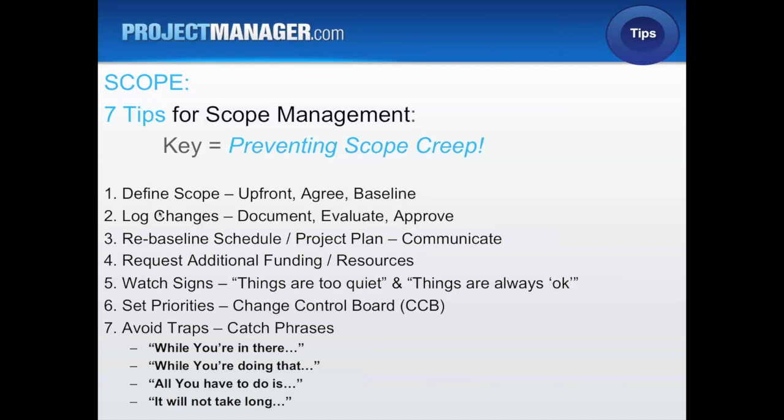And for most companies, that process is not such a quick thing. So you have to allow time, and that also needs to be defined in your change control process, is like what is the process for the funding. Because you don't want to be scrambling trying to figure it out along the way or real time. You want to know up front when that happens, what is the flow, who do you go to, who do you submit the funding to, who's going to evaluate it, who's going to approve it and release it.